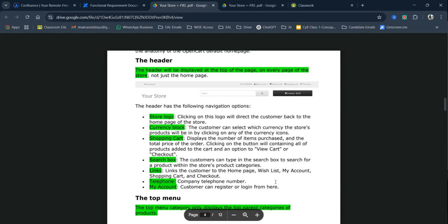These things aren't mentioned over here. And also, there should be acceptance criteria. How do we know this is actually ready to go in the market? How will we test the specific parts? How will we test the homepage? What will we be comparing to if there is no acceptance criteria? We need to compare the outcomes with the acceptance criteria to see if they match.